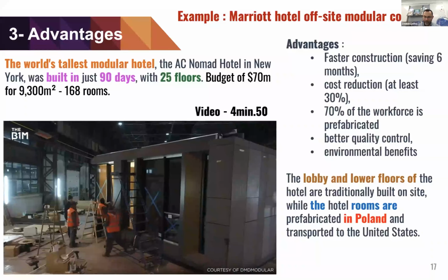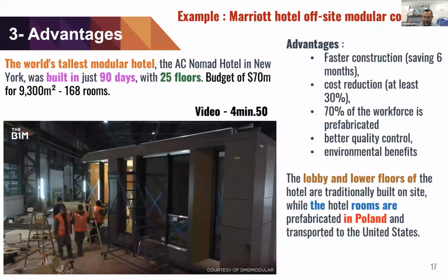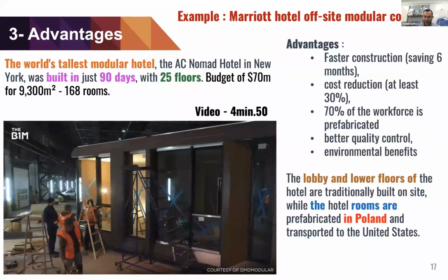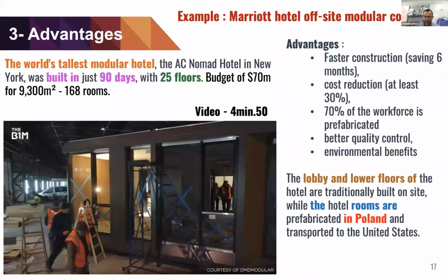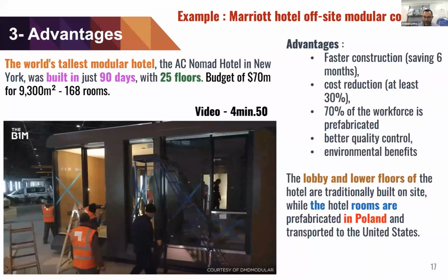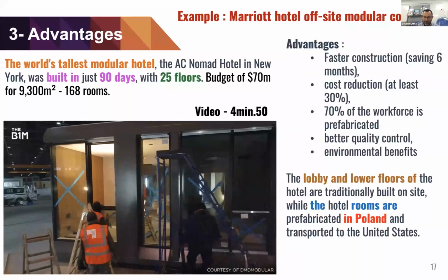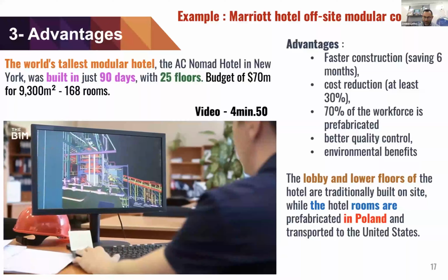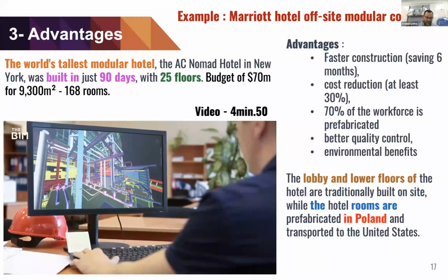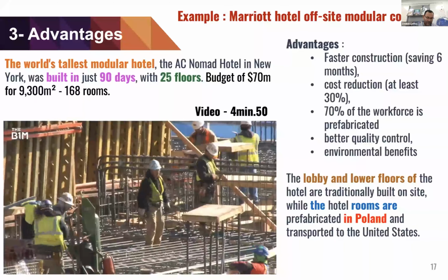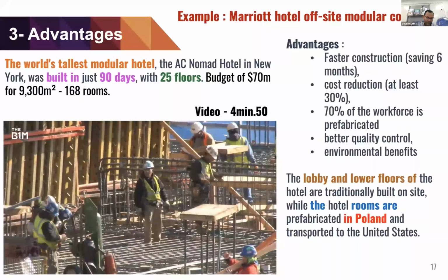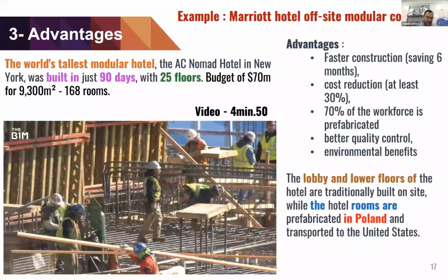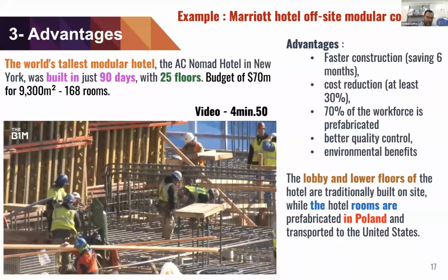Additionally, by making use of factory-produced modules, site-specific tasks such as excavation and foundation works can be undertaken concurrently, while the structure's modules are fabricated away from site. Despite a slightly longer pre-construction design and planning phase, this approach can reduce the on-site build time for a project of this scale by up to 6 months, while reducing the amount of on-site labor required by nearly 70%.